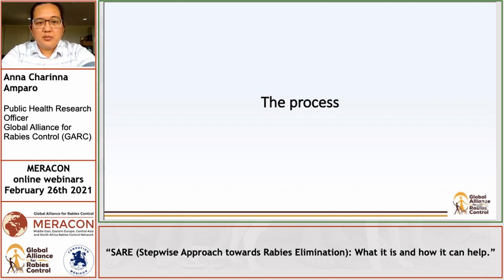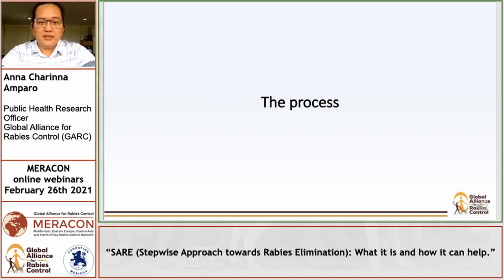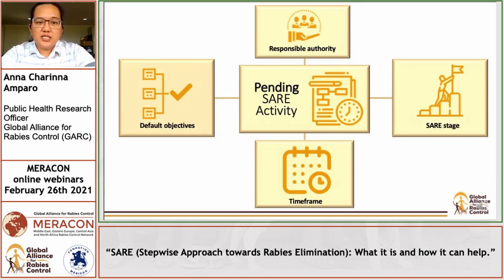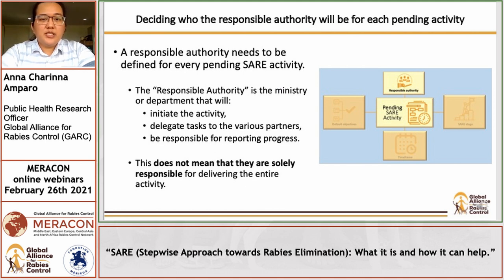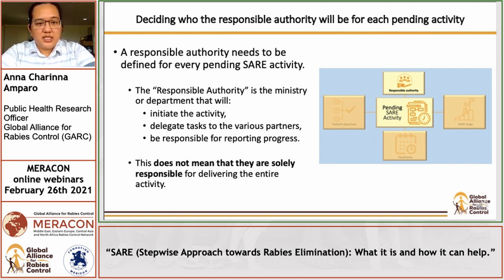For the next few slides, we'll be talking about the process of refining this generic work plan and developing your own country-specific work plan. For each pending activity identified during the SARA assessment, we need to define the responsible authority, customize objectives from the default ones provided in the generic work plan, and set a timeframe based on the SARA stage. A responsible authority needs to be identified for each pending activity — this is the ministry or department that will initiate the activity, delegate tasks to various partners, and be responsible for reporting progress. This does not mean they are solely responsible for delivering the entire activity.